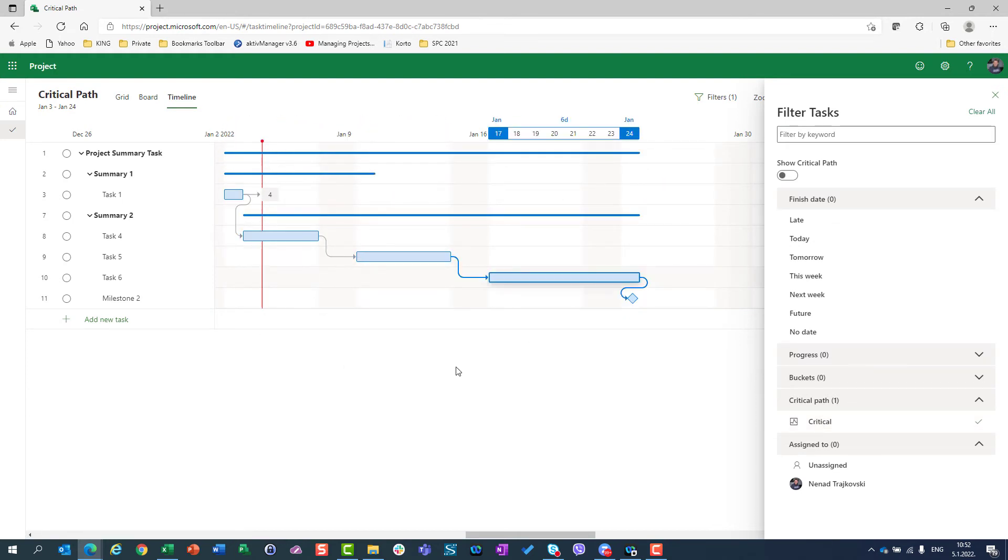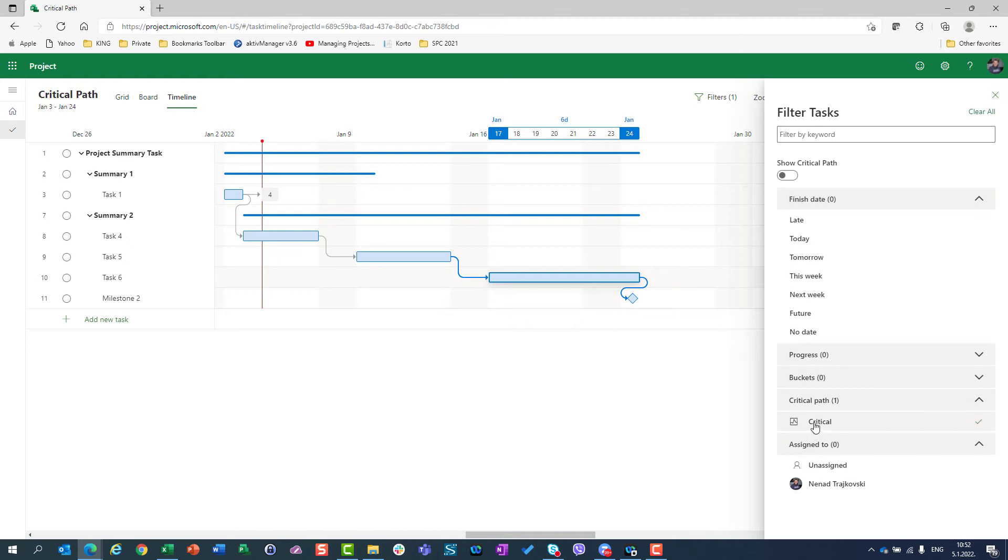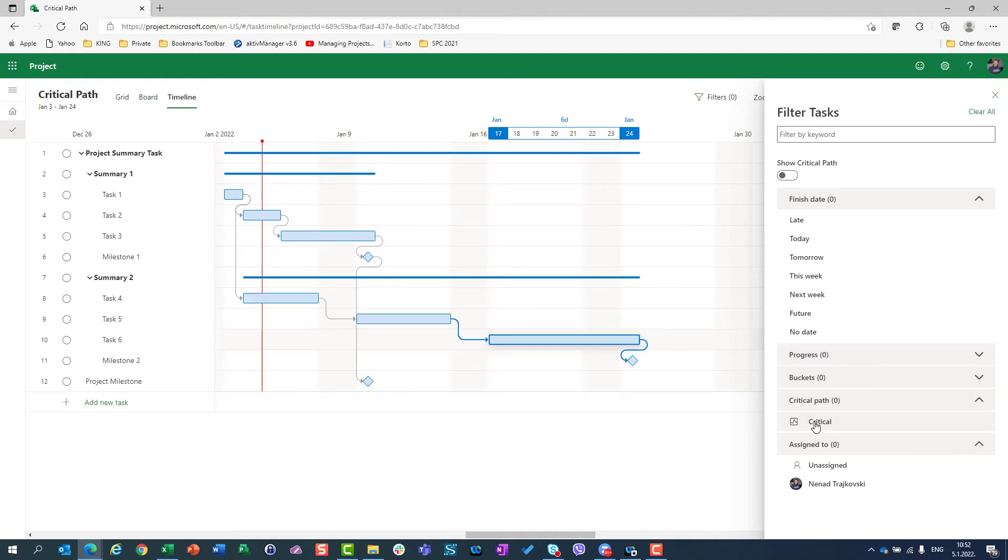But what if I want to see tasks which are on Critical Path but I want to see also the whole project? So this obviously doesn't fit my demand. So I will turn off the Critical Path filter, but I can see here Show Critical Path.